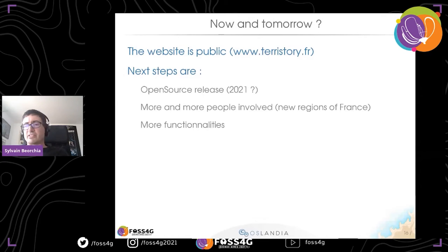There is a new release about each month. Sometimes we have to hurry in order to stick to the schedule decided by the consortium. And if you are a web developer, you know that hurrying may not be good for the quality of the code. So the consequence is that we must sometimes do code refactoring in order to keep a level of quality.